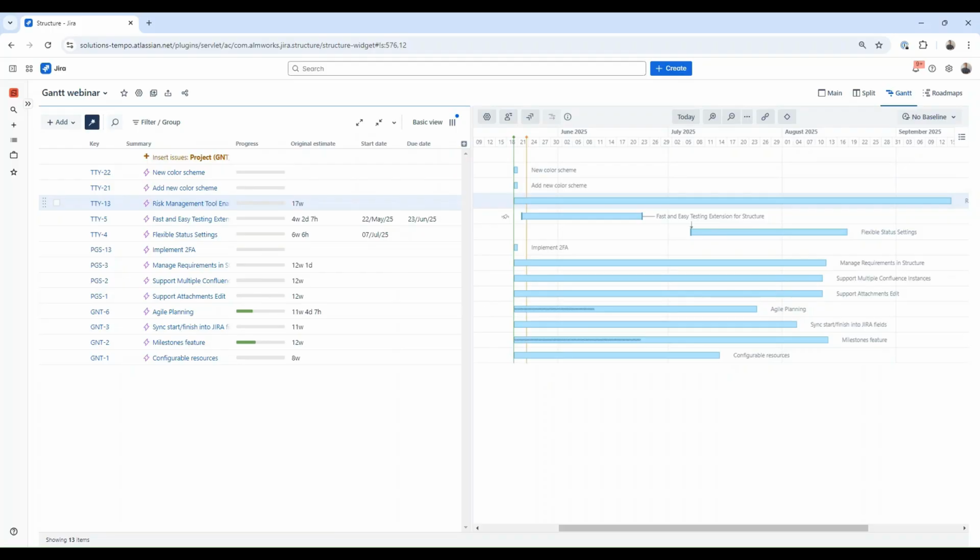Now, as we know different ways of scheduling tasks on the chart, let's go ahead and proceed with building a simple roadmap. We will be using different assumptions on how we schedule items based on if we know exactly when the item should start and finish, or if we want to commit to specific dates. Or maybe we are not certain about dates yet and just have a rough understanding of the sequence of the work we have. In this case, we can use dependencies to stack tasks in a certain sequence without really committing to any dates yet. So let's put some dates in for that item.